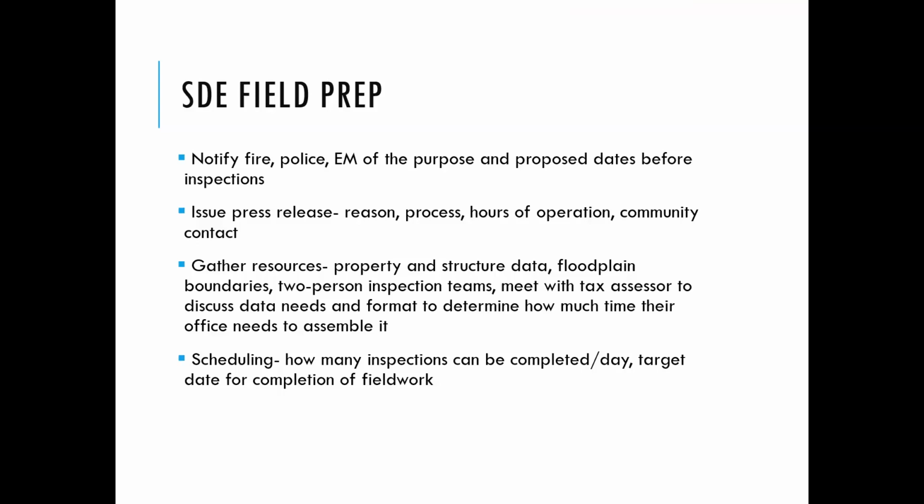Gathering that property and structure data. So I would really encourage you to have a property inventory in your SDE software before something happens, because you don't want to be scrambling around trying to get tax assessor and other property and structure data for your floodplain properties after something has happened.